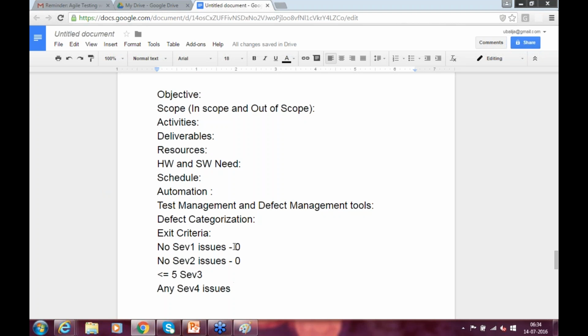So this was the sign-off criteria that we used to follow in my product, like no severity 1s, no severity 2s. Severity 1 and 2 are critical issues. There should not be any, but there can be some, less than or equal to 5, of severity 3 with the decision that we're going to fix them in the upcoming releases. In Agile, we're going to call them sprints. So if you can give a confirmation that in the next sprint you're going to take these up, then probably this sign-off criteria holds good. And any number of severity 4 issues. Severity 4 issues are generally the...